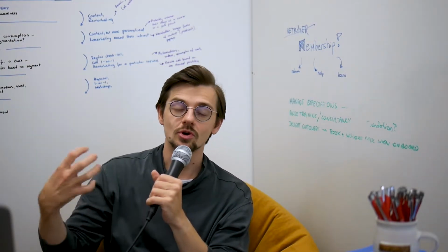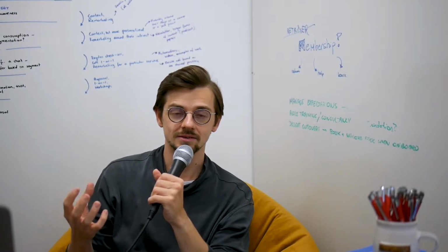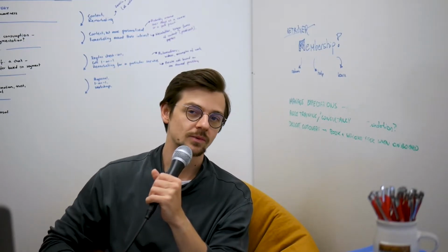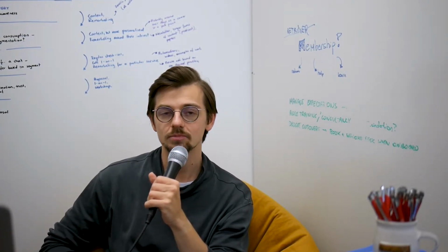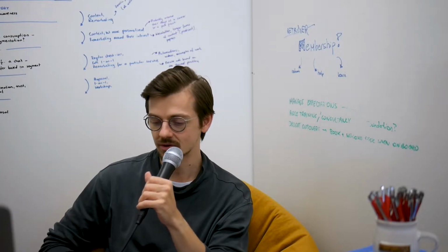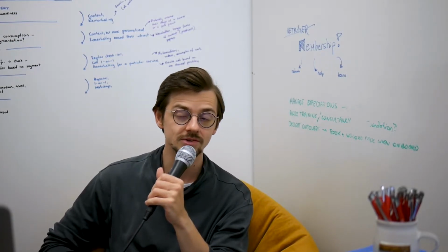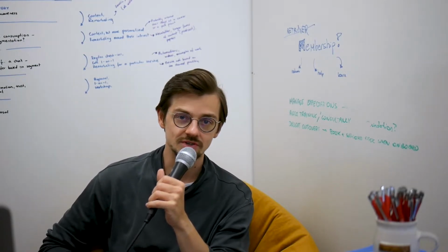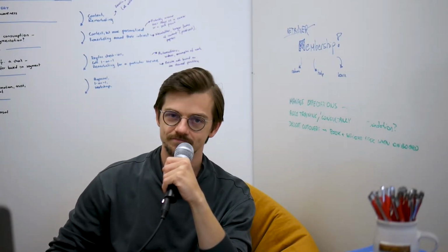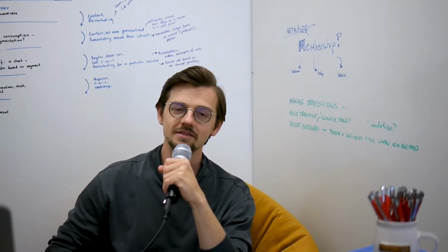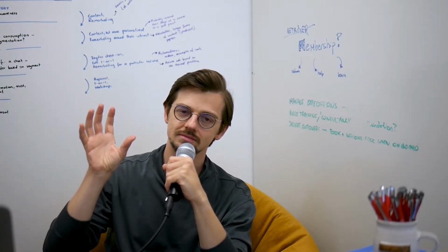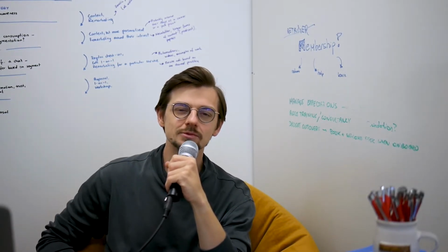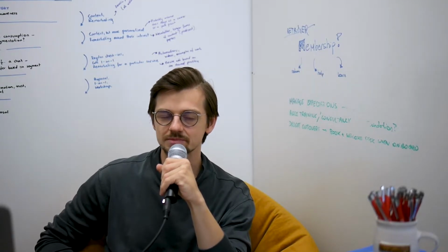To establish more control over a website project like this, here at NerdCow we meet at least once a week. And that shift helped tremendously to keep everyone in the loop, including stakeholders and the client, and it just makes the collaboration that much easier. But there is trouble in paradise. If you have shorter loops, shorter cycles, and you meet more often, it comes with a higher project management tax.